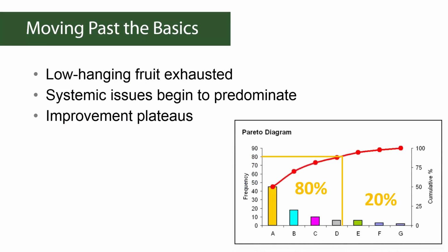And so with new Agile teams, they'll start to address all those things that are within their easy control. They get better at not overcommitting to the sprint. They get better at communicating so that they're sharing work on tasks rather than working in individual silos. And pretty soon the systemic issues that are maybe wholly or partly outside of their control, or that are harder to address, start to come about. And so improvement may reach a plateau.